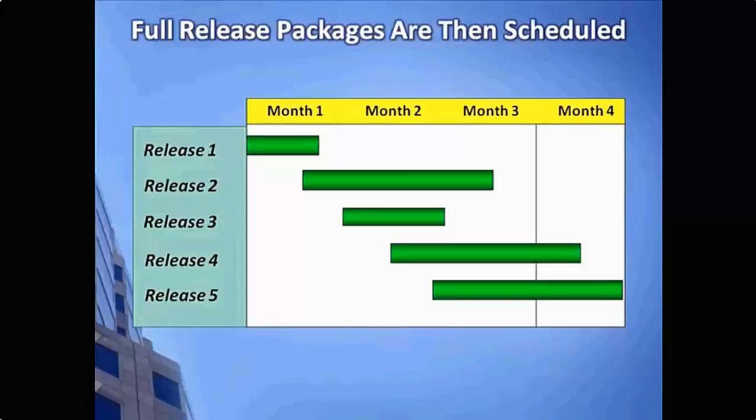Your deployment, or now transition plans, should identify all the planned releases and their time frame targets when you develop it. This will be a very key area watched closely by the program office and your program sponsors. As you go through the implementation effort and the transition effort, this will be monitored and modified as needed over time as your transition activities take place.